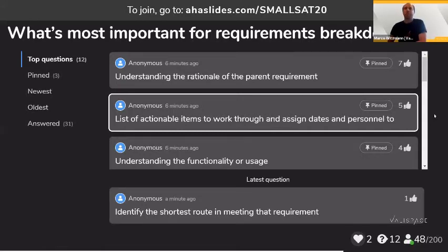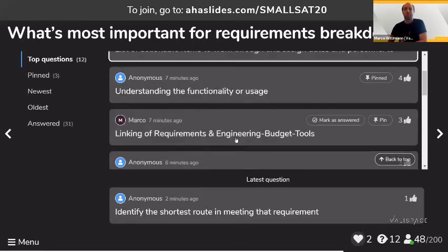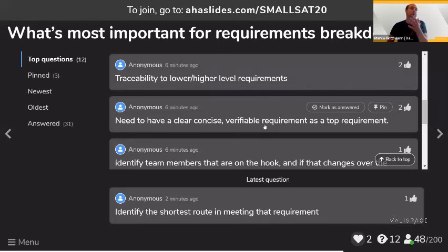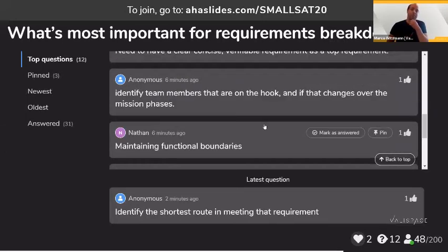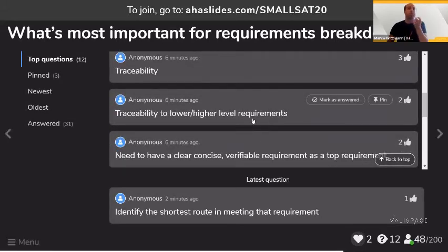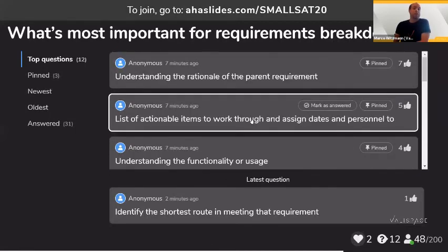So make sure that the requirements are more than just the text. Make sure that it has context. Make sure that it has a responsible person who still knows why it is there, and try to link it, if you can in any way, to all the places this has been used. If you have technical methods of tracing where this value of the requirement has been used in analysis, do that. It will save you a lot of hours and nerves once you get further down the line.